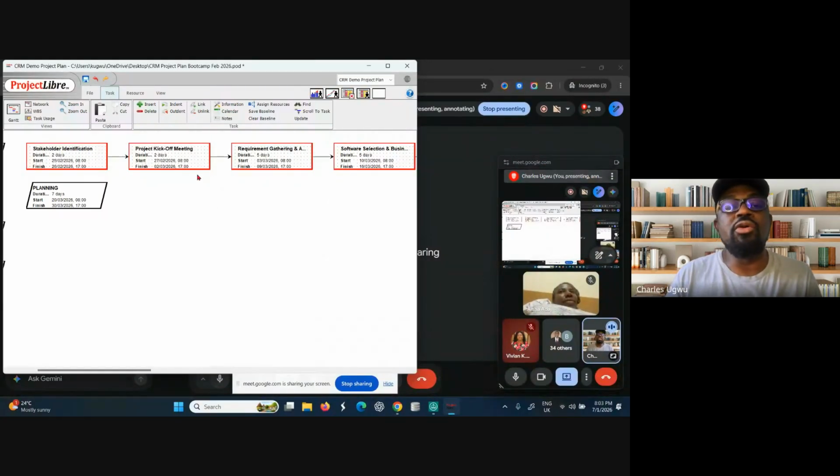There is zero tolerance, no float, no zero floats on critical areas. They must finish when they are supposed to finish so that another team can start. Automatically, if this is meant to finish in 40 days, if you miss this, then it means it's going to be 41 days.